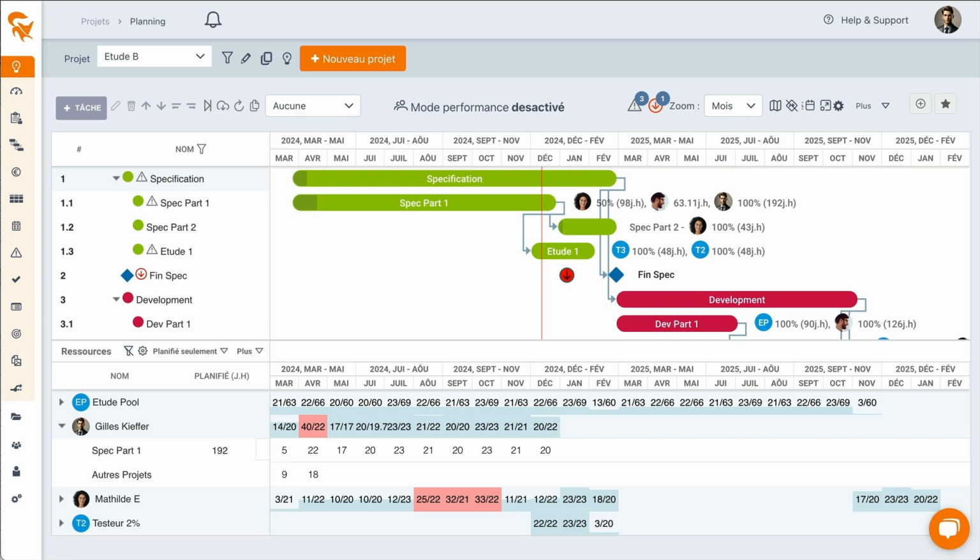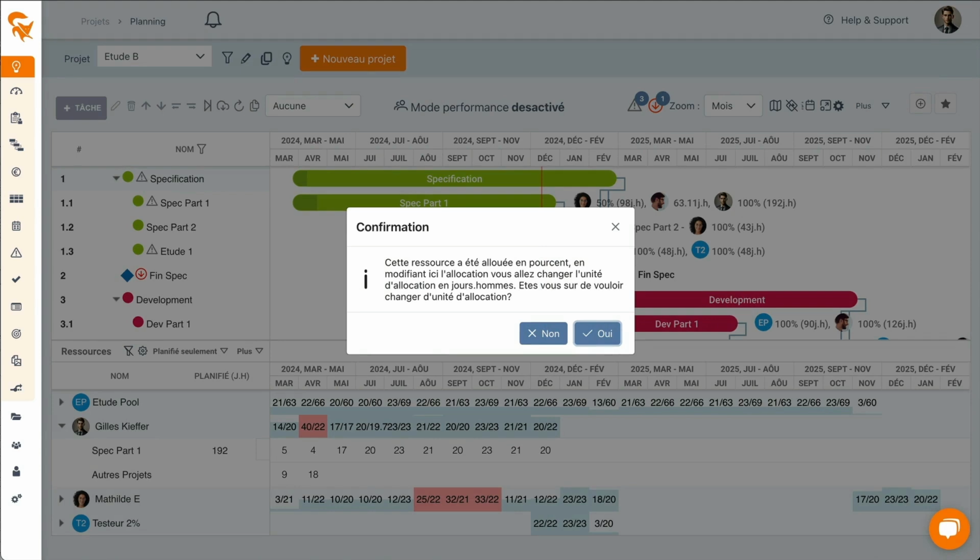Let's take the example of a project where we have a resource allocated in April. We can see that there is an over-allocation. If we want to correct just this over-allocation, we can do it here on the attachment. Here, in this instance, we observe that the resource has overall 18 days too many in total. We're going to rectify those 18 days exactly and put 4 on this given month specifically.